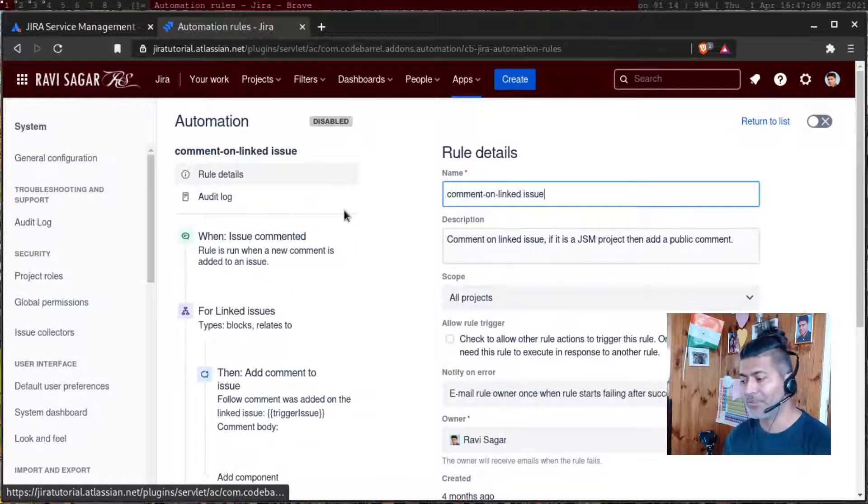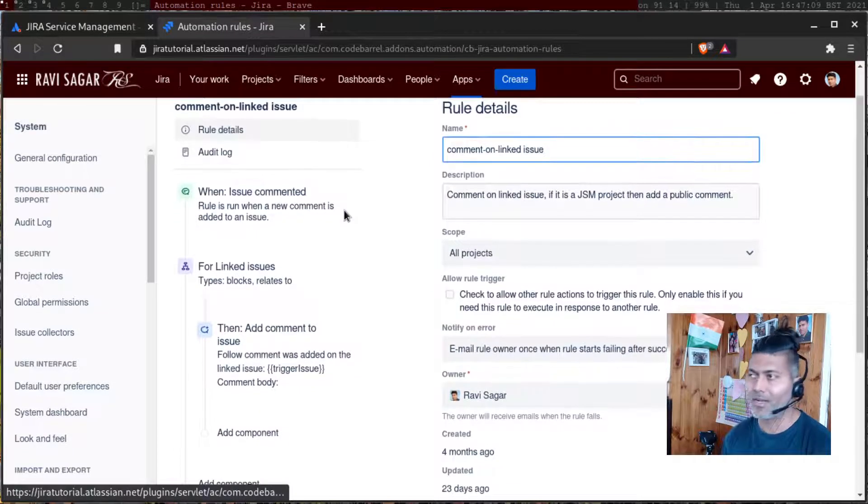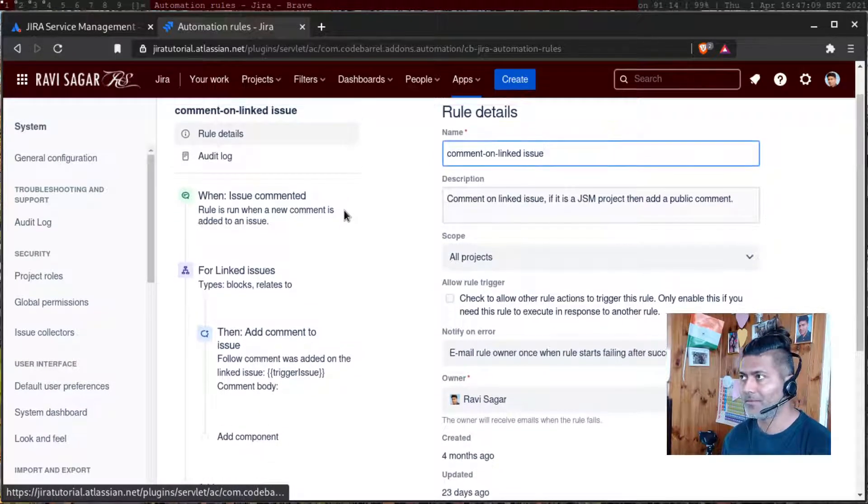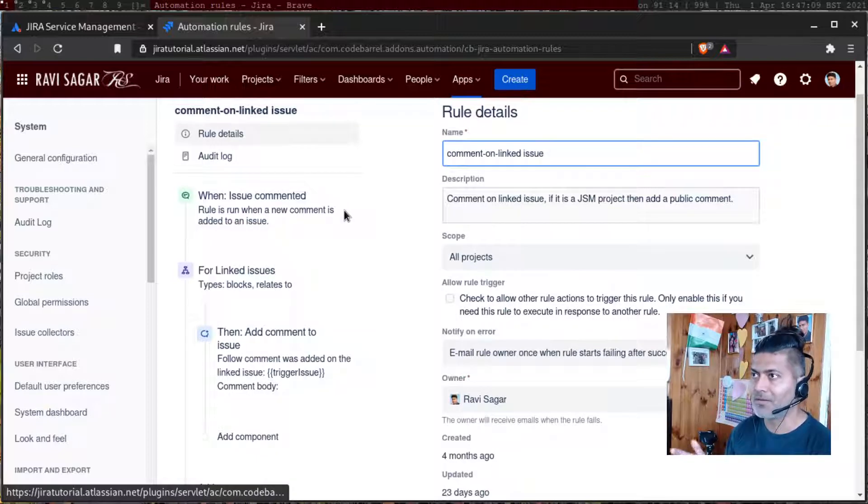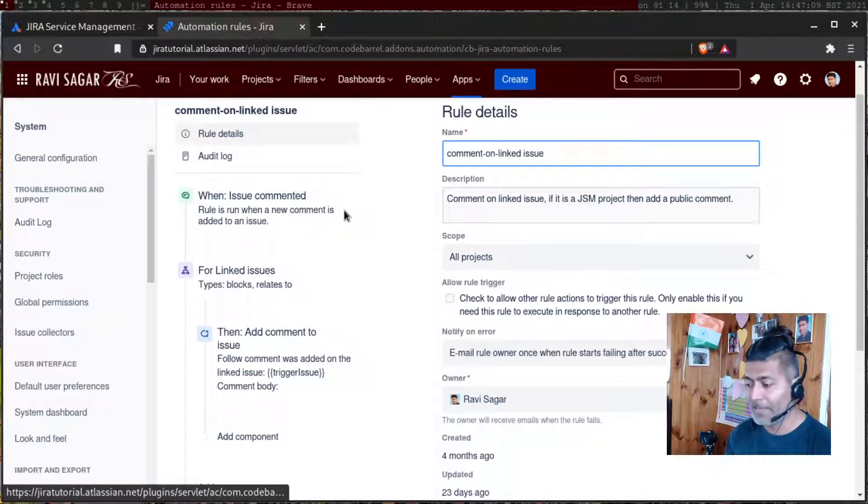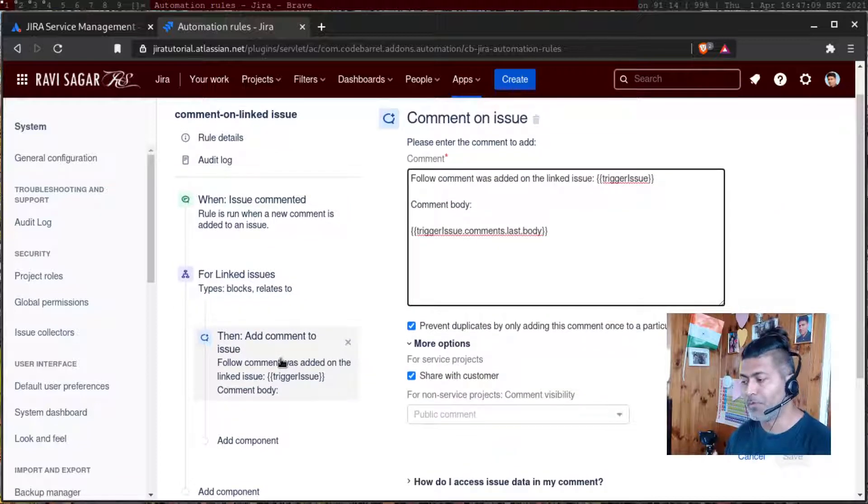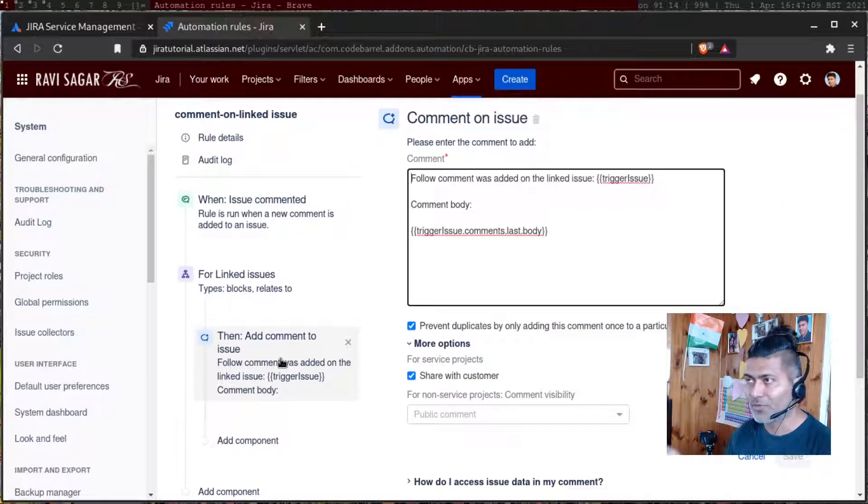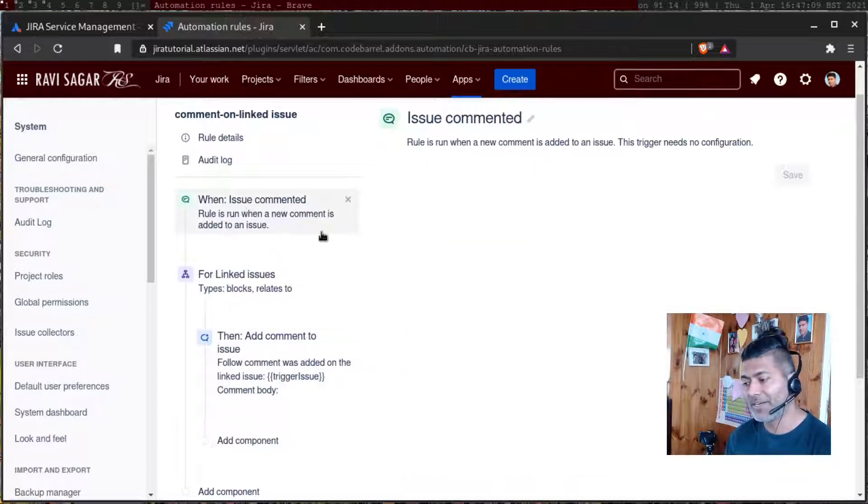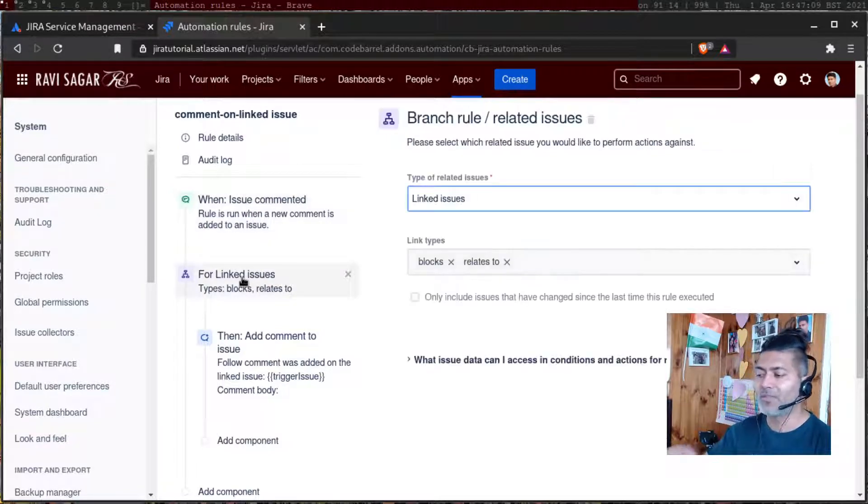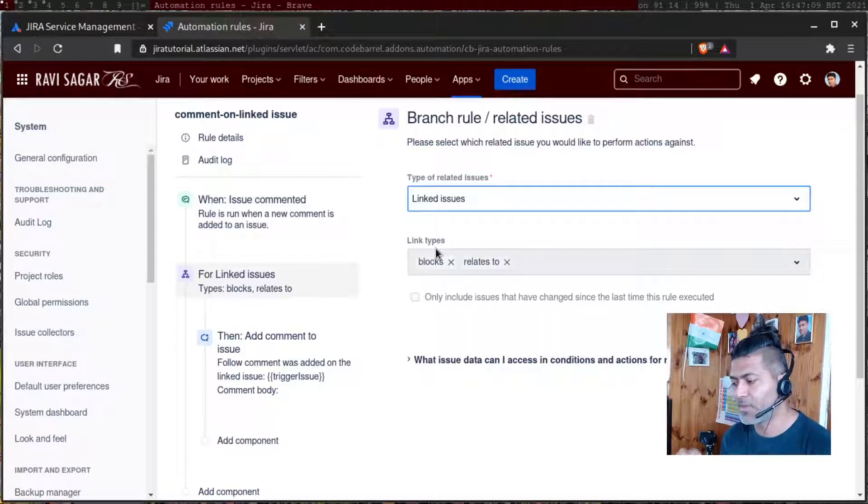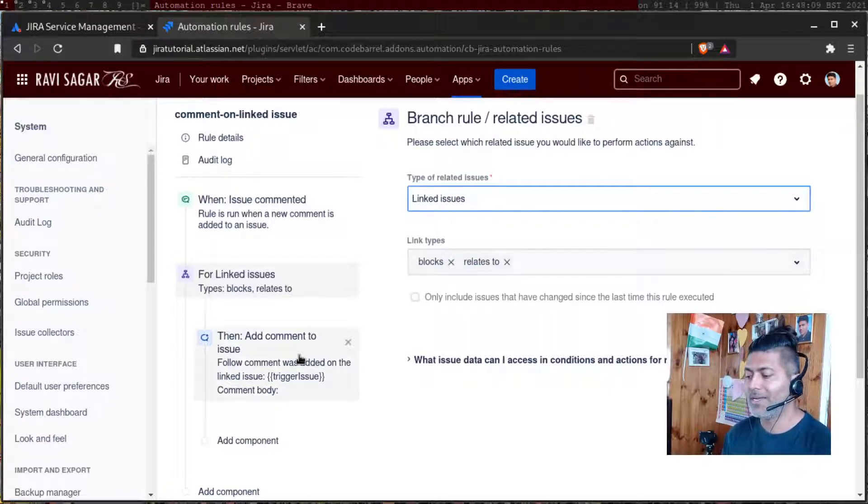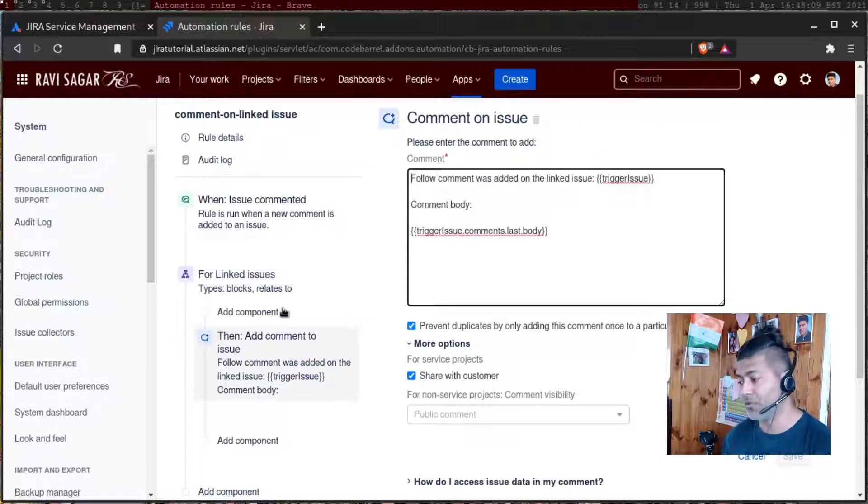For example, if you comment on linked issue, so let's say your second line or third line agent - I guess they are developers - they're using something in their own project. As you have a link, you can pass information from your issue, your software issue, to your Jira service management. You can trigger this rule when the issue is commented, then for linked issues, there's a branch rule, where you can specify the way you can limit the rule to run for a specific branch.